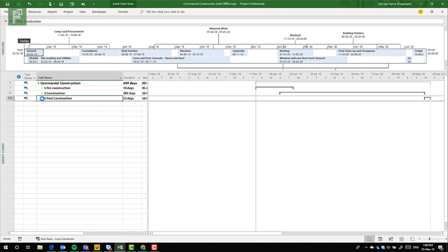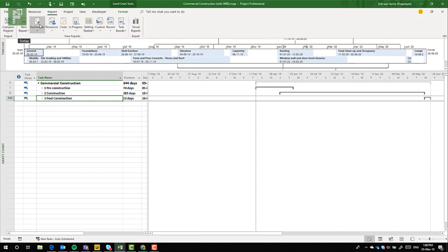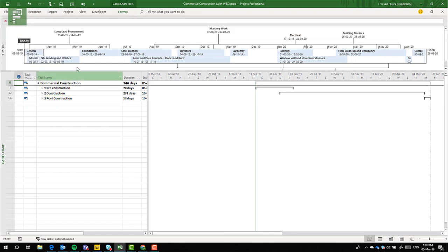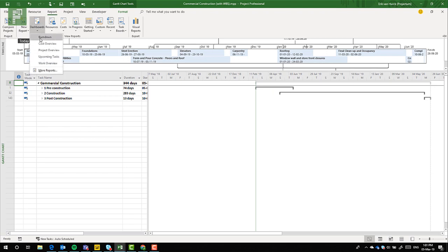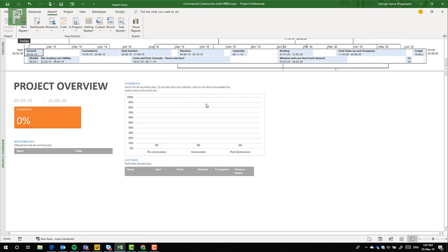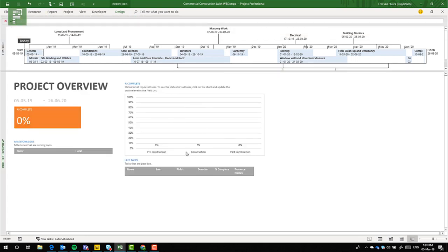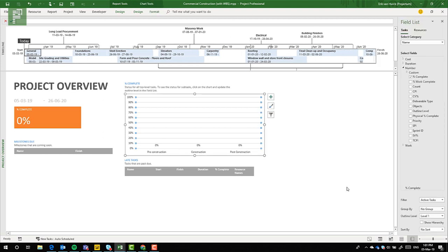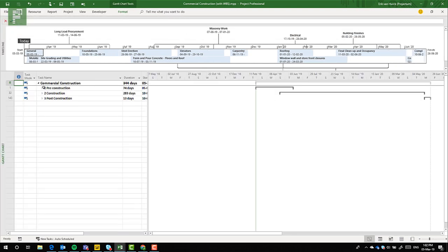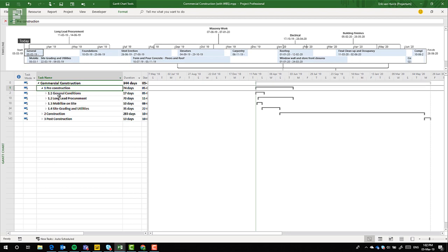So it might be clear already that a work breakdown structure is really needed in any schedule, not just the ones that have 100-plus tasks. But just to be completely clear on why these summary tasks are also nice to have in a report, if we navigate to the dashboards and go to project overview, it will already be leveled on the first level of the work breakdown structure. That's by default, and it's visible when you go to the outline level, and it says here level 1. You can navigate to other levels, but be sure to have those levels open in your schedule. So for instance, if I open up the first summary task, all the activities 1.1 to 1.4 will be visible.